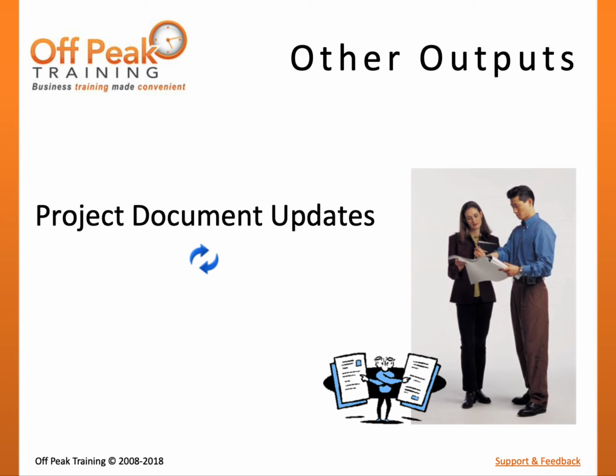Finally, many processes may lead to updates to project documents. Since project documents are not subject to the same levels of approval that the baselines are, these updates may not require formal change control. However, to ensure best practices of proper versioning, access control, and notification, it is important that configuration management rules are followed.